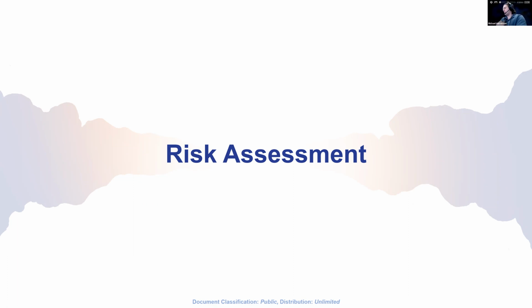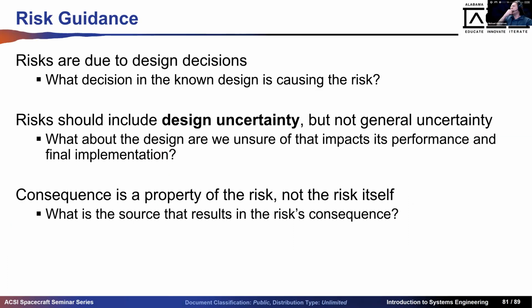All right, move on. Last section before the summary. Risks are not consequences. A lot of times we see people say, well, the satellite could break this way, so that's a risk. Risks come from design decisions, but just because the launch vehicle has a lot of stresses or because space is radioactive, that's not a risk in and of itself.